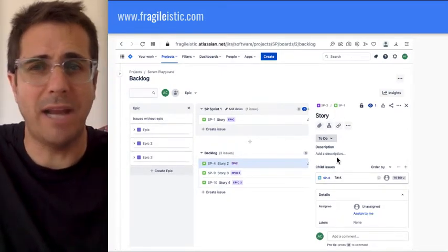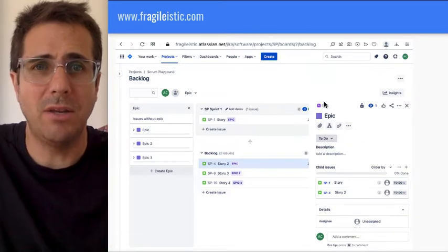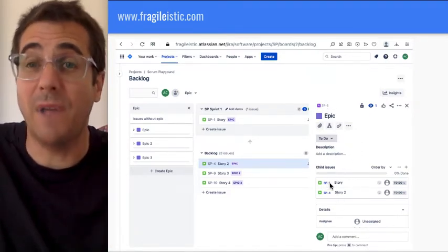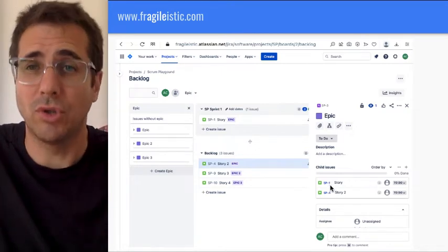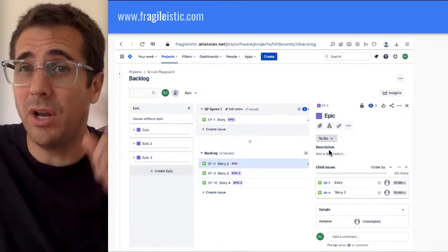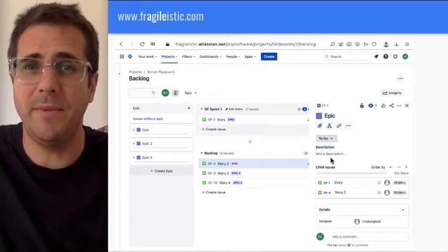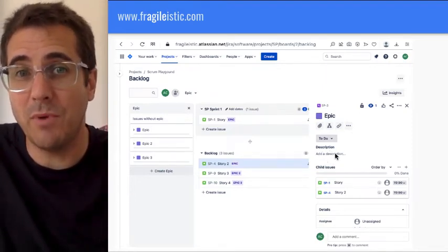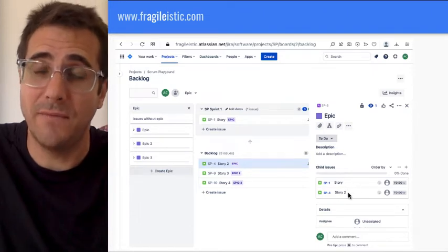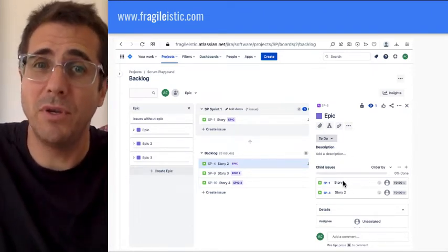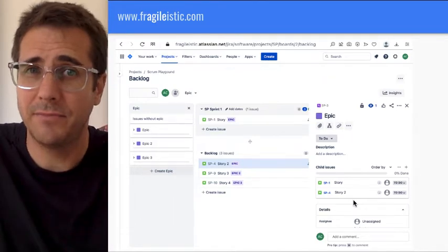So I'm just going to go back and show you that again. In here, you'd make sure your epic was up to date before you'd even probably refine and even define what your stories are. You'd need that description. And I've run a lot of sessions with individuals trying to train and coach people to do this refinement. Anyone who skips the session where we write this description in and then tries to define what stories they want, they can't do it. You've got to really understand what the definition of done is before you can start talking about how you're going to deliver it.